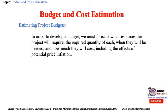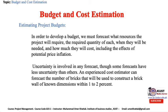In order to develop a budget, we must forecast what resources the project will require, the required quantity of each, when they will be needed, and how much they will cost, including the effects of potential price inflation. Uncertainty is involved in any forecast, though some forecasts have less uncertainty than others. An experienced cost estimator can forecast the number of bricks used to construct a brick wall of known dimensions within one to two percent.